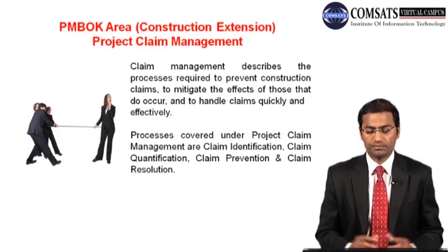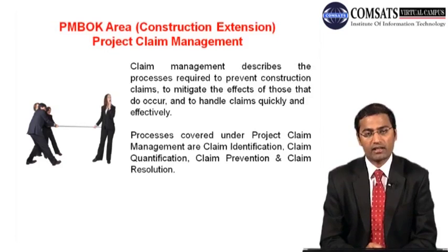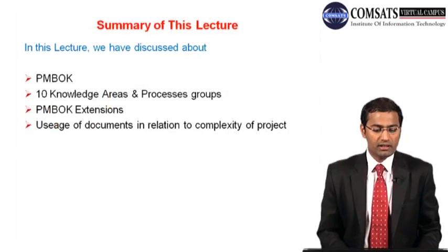So claim management describes the process required to prevent construction claims, to mitigate the effects of those that do occur, and to handle claims quickly and effectively. And processes covered under project claim management are claim identification, claim quantification, claim prevention, claim resolution. So in this session, we have talked about PMBOK.